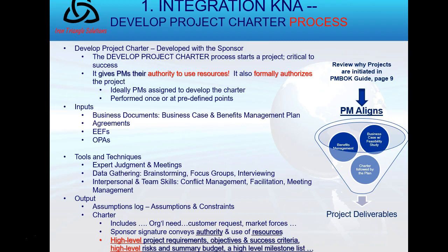Okay. The data gathering techniques, remember you're early on in the process, so you don't have a lot to work from. You'll do some brainstorming. You will conduct focus groups by bringing key people together, asking them focused questions, defining success criteria. You can also do that in the interview process. Before I begin any project, I identify the key stakeholders. I go around asking them a series of questions about risk, success criteria, requirements, regulations. And the last question I always ask every stakeholder is can you name other stakeholders that you think I should talk to?